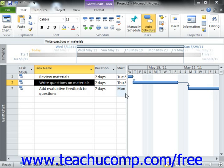You can also create inflexible constraints. Using inflexible constraints prevents the rescheduling of the task. For example, using the "must start on" constraint forces a task to begin on the date specified. When you specify an inflexible constraint, the task will never be automatically rescheduled for any reason.